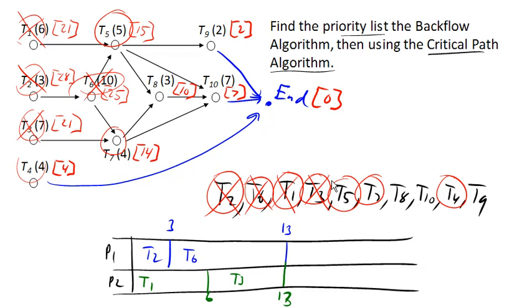So I guess task 4 is going to have to wait because we're assigning task 5 and task 7. So task 5 has a time of 5, bringing us out to 18. And task 7 here has a time of 4, bringing us out to 17.